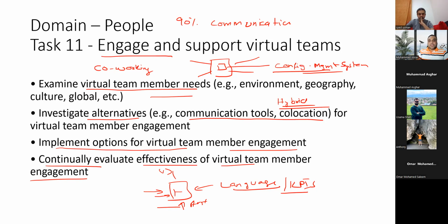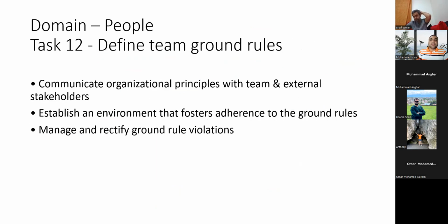When it says communication gap, it means in the next task, I have to understand and define the ground rules based upon the communication management plan. What is the communication management plan? Who needs what information, how, when, in which format, which technology, which frequency, which portal, and so on. So you have to use your communication management plan, and establish the ground rules to work with this communication management plan. And you have to keep updating the ground rules.